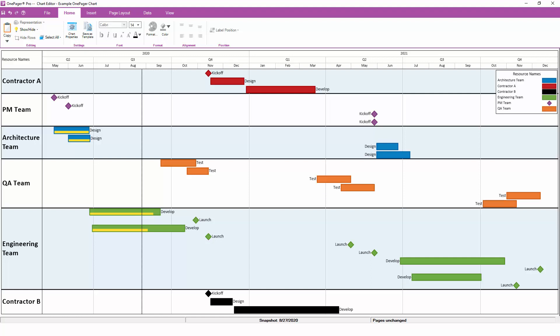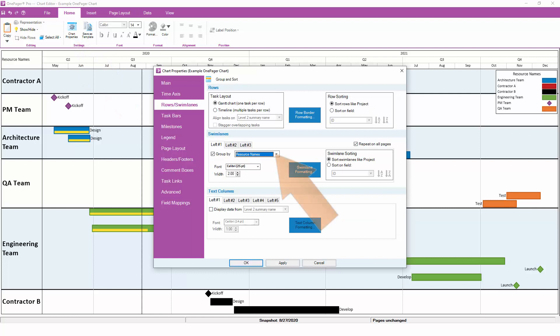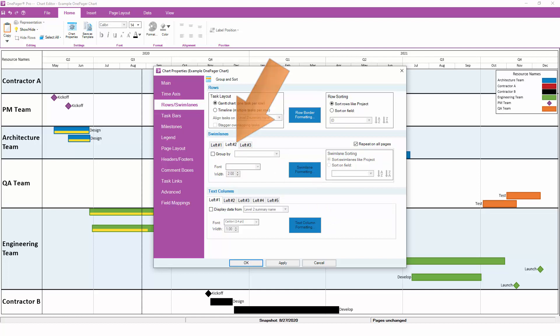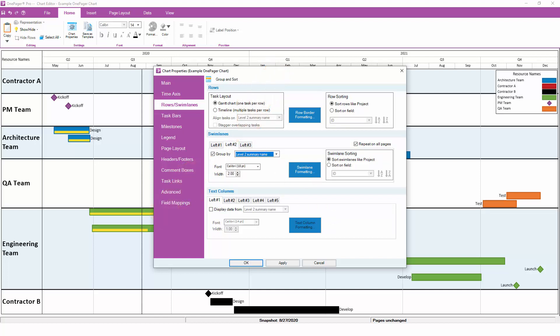OnePager supports up to three levels of nested swim lanes, so if you have a hierarchy in your project plan that you'd like to reflect in OnePager, it's pretty easy to do. Here, we might want to group first by the Level 1 summary name as we'd done originally, but then group a second time based on the Level 2 summary name. Think of this as grouping first by phase and then by workstream.